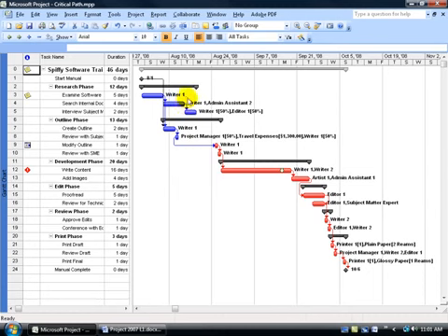We already talked about the first non-critical path. Here's the second one. The first task here starts on a given date. It obviously doesn't go beyond October the 6th, but its successor here, when it's finished, finishes on October the 12th. So I could have that finished later and still be fine, up until we get to this point, where it begins the critical path, which is for modify outline. And that has a constraint on it. In fact, you can see it over here. It says this task can start no earlier than August the 25th.